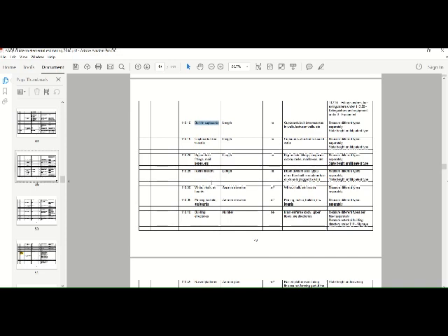You might even get the cost of cupboards from Lotus Pine, or even from Builders Market, or any place like that. You might get an idea or feel of cupboards, and you try and take that rate, add the installation cost, the labor cost, the margin of profit, or you just make an allowance there. You can use your discretion on that. I'm not going to mark those items too strictly. The main thing is that it should be in the ballpark, more or less.